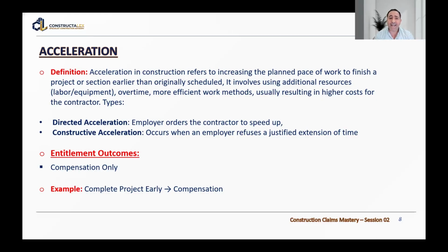We have constructive acceleration, and that occurs when an employer refuses a justified extension of time, and this is important, a justified or valid extension of time.